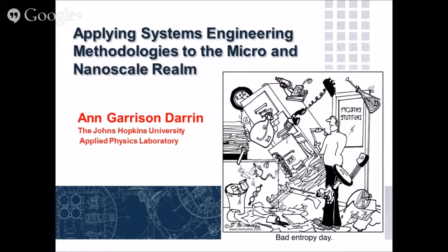Okay, let's start. There are two basic questions there. First of all, we had what you would see as very traditional gates. You can't get away from that. I don't know how to get away from that. I don't know if I'd want to. You have to have gates, PSRs and CDRs and things like that, because you have to actually stop sometimes and say, are we really where we want to be? And did we meet the customer? This is where we bring in and socialize with lots of the sponsor base to make sure. So we never, ever threw any of that out. You can't. I'm not willing to. Not if you're going to do something critical like go to space.